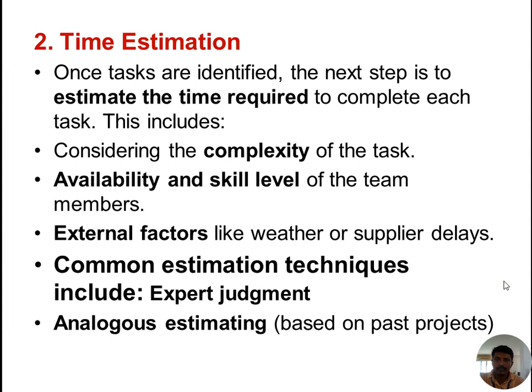So let us know more about time estimation. Once tasks are identified, the next step is to estimate the time required to complete each task. This includes considering the complexity of the task and the availability and skill level of team members, and also external factors like weather or supplier delays.